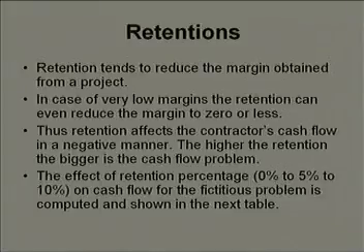Now, you will also notice that the retention, if there is in the project, affects the contractor's cash flow in a negative manner. That means the contractor has a problem if a large percentage of retention money is recovered from every bill and it is kept with the owner for a longer period.